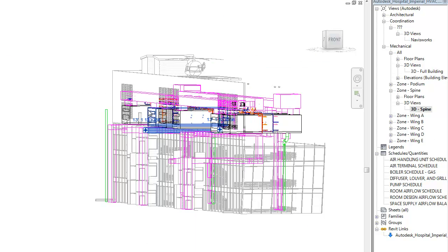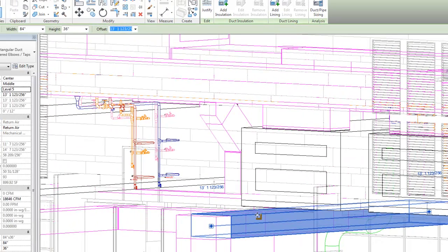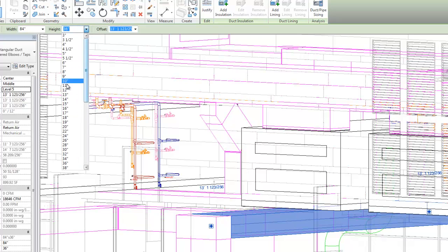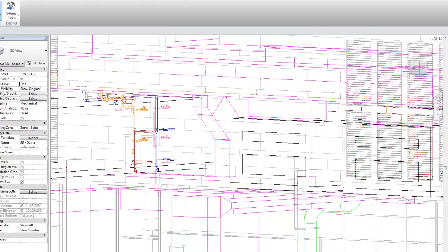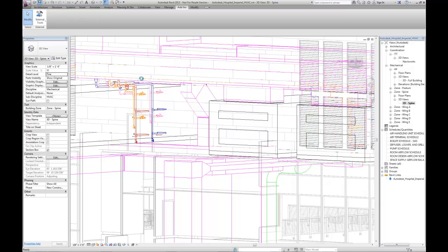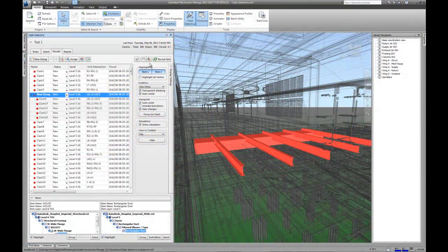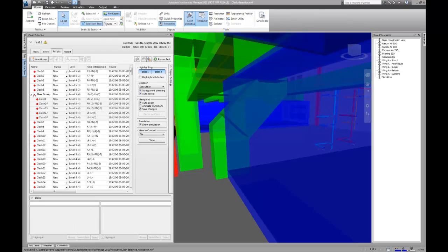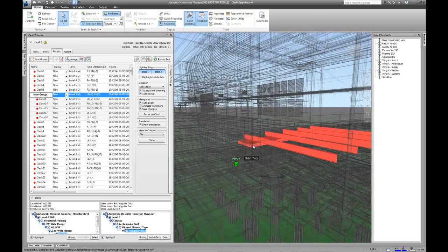As the issues are identified and managed, coordinating the needs and changes with the design or construction models are made easy with tools that group similar conflicts together, review in both 3D and 2D, and can switch between the single construction model and the originating design model. Here we see that we easily group clashes for one building component together, assign them to the appropriate stakeholder, and easily switch to the design application where the conflict can be resolved accordingly. This saves time in locating the conflicts and ultimately streamlines the workflow for resolving them.